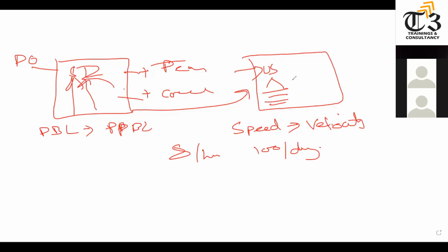Once they break them down into tasks, it becomes the iteration backlog, where they have the tasks. Now they will start working on the iteration, which is 2 to 6 weeks maximum, where every day they have to do the daily stand-up meeting, an Agile ceremony, we call it. Daily stand-up meeting: what you did yesterday, what you will do today, and what are your impacts.